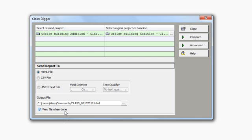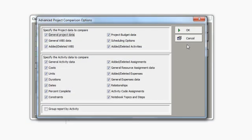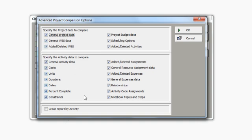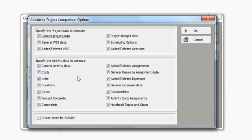Over here on the right, if I click the button called Advanced, I get to specify what data I would like to compare. You can see there's data at the overall project level up here at the top, and then down here at the bottom, some specific information pertaining to each activity. The report that I can print can either be grouped by subject area or by activity. If I want the report to group by activity, I need to check the box down here at the bottom. The example that I'm going to print, I'm just going to let it compare all of these options. So I'll click OK.